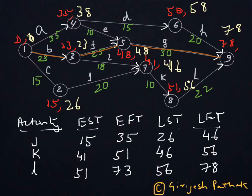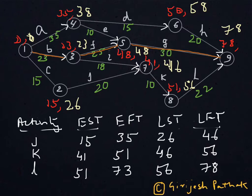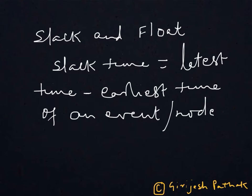For all the nodes where earliest time and latest time are the same, they are actually on the critical path and the slack time for them is 0. But for the rest of the nodes where the latest time is higher than the earliest time, the difference between the two gives us the slack time. Slack is generally related with nodes or events, and the slack time of any event is computed by subtracting earliest time from the latest time of that event.